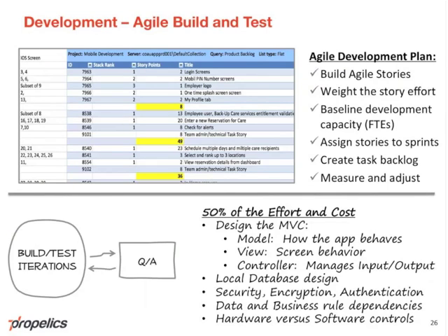So the middle part of the project now, we develop our agile development plan. So literally build out the stories. The stories are the flow. The application developers are able to create their tasks based on what needs to occur per screen, what integration exercises need to occur. The UX guys are helping with any additional assets.